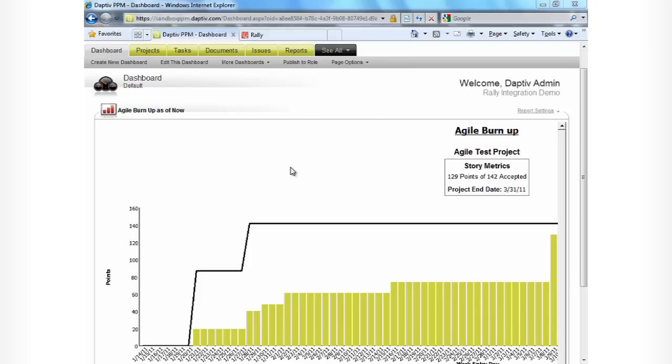Here, we can see an agile burn-up report that shows the change in story points over time, and also the number of story points accepted as we go through the project. It also shows a project end date estimated to be 3-31-2011.